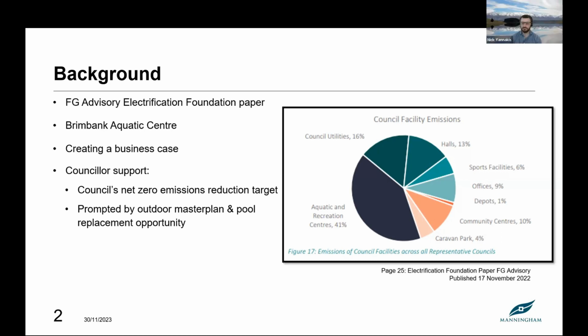Looking at the aquatic centre, we've also got works to revamp our outdoor 50-metre pool, which we'll go into later. These works will align with those works and try to get as much outage of pool usage done for works at the same time. So it all wrapped up in a nice, neat little bundle, and we were able to go ahead and create a feasibility study from that.